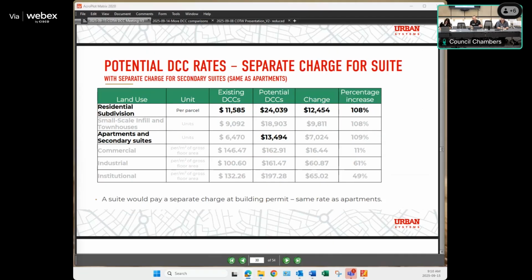The 2022 DCC bylaw that saw significant increases was using, for the most part, funding estimates from 2020, 2021. We've seen the cost of our infrastructure work double in some instances since that time. So, to be brief, yes, we can bring that information forward to show why, even in the short term, there could be impacts or restrictions on current investments if we don't move forward with proactive funding. Thank you. I think that would be an important metric to add into this discussion.